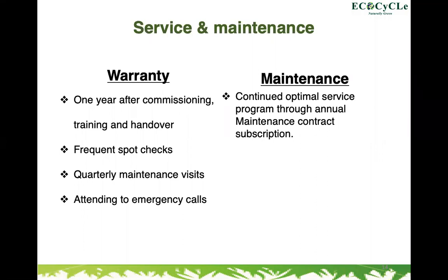Usually, once the technical team has come to your site and installed your system, the client or the client representative will always be there, and we'll show you all these processes. Then you'll be satisfied that all these things are working. Once you are satisfied, we'll commission the project to you. Once we've commissioned the project, we'll give you a 1-year warranty, so that whatever happens to that system within the 1-year warranty, we will be responsible for it, so long as you follow every instruction that we give.